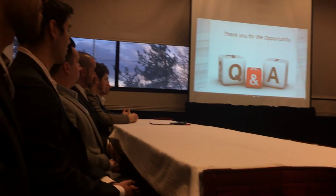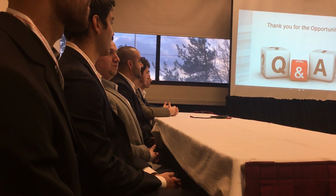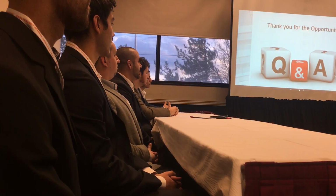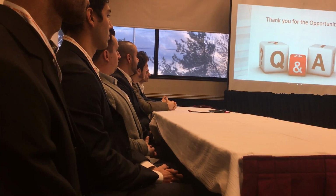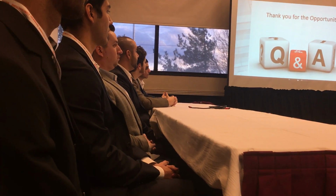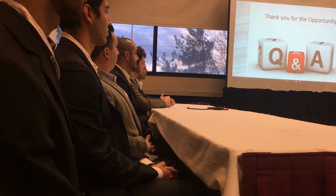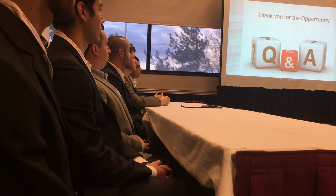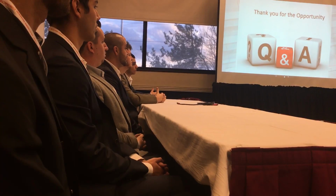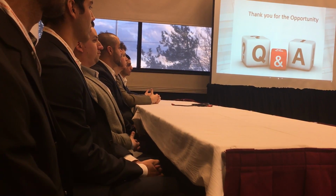We'll utilize a pre-construction meeting with each trade, and then we'll have our 6-week look aheads, 4-week look aheads. We'll have our foreman's meetings once a week, so that way they can relay any discrepancies and any trades that may be working on top of each other and help mitigate any of that bottleneck that may occur. But we'll be in communication with them numerous times leading up to the job, and them showing up on site, and then throughout the project also.